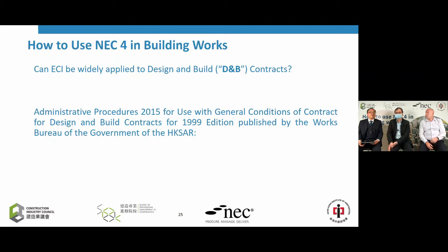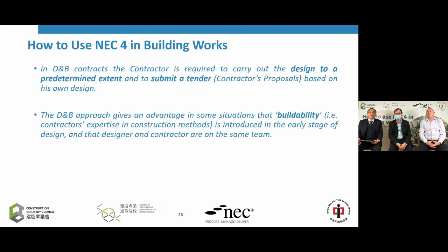Now, let's look at the conventional thinking, okay? First of all, we have this publication by the Hong Kong SAR government on the administrative procedures for use with general conditions of contract for design and build contracts. The comment by the Hong Kong SAR government is that in design and build contracts, the contractor is required to carry out the design to a predetermined extent and submit a tender, that is the contractor's proposal, based on the contractor's own design. Secondly, the D&B approach gives an advantage in some situations, again, the word buildability.